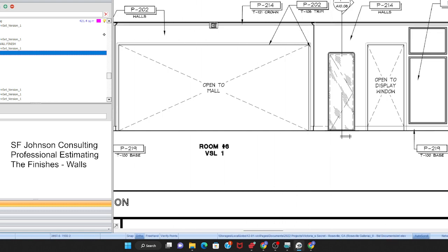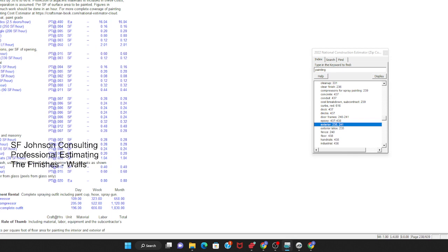And as you saw from the cost book, linear 0.05, that's most out of everything. Man hour totals, 0.05 to paint trim, to paint trim and post, linears, 0.050 per unit, per linear foot. Look at all of the other ones that you can paint. A ceiling, a wall, baseboards. But the trim post, you got to go all the way around in the circle, right? So that's why that one.